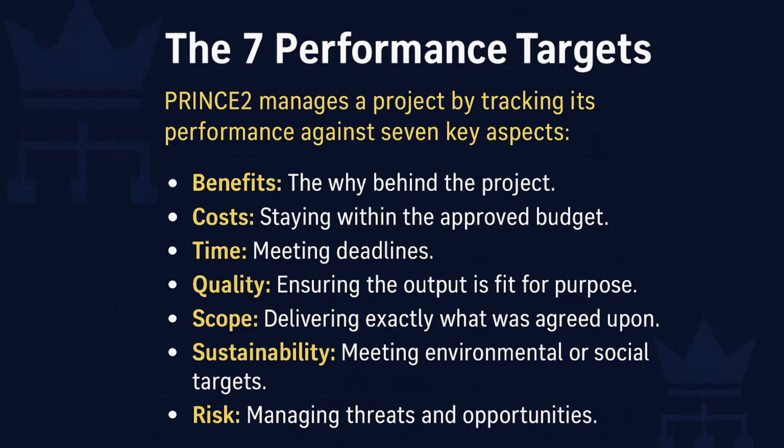And the team's doing the actual work, the specialists. They interface with the project manager through the Managing Product Delivery process, or MPD. This process is about accepting a work package from the PM, executing that work, creating the required products, and delivering them back to the PM, ensuring quality checks have happened. It's the bridge between the management level and the specialist delivery level. Okay, so CS manages the stage, MPD delivers the products within it.